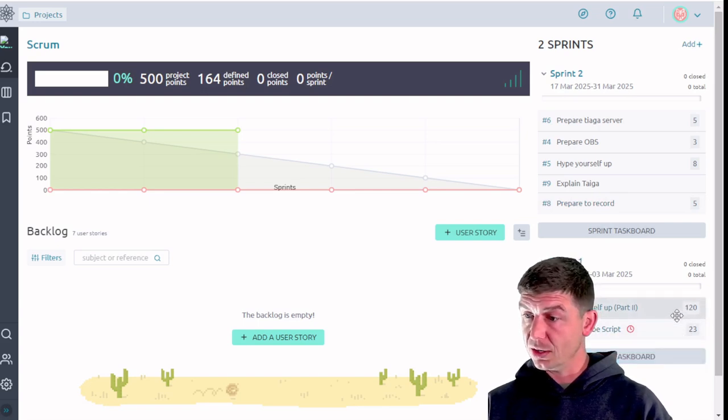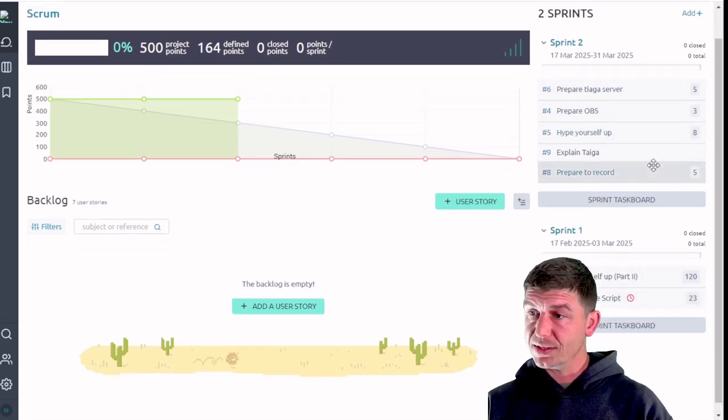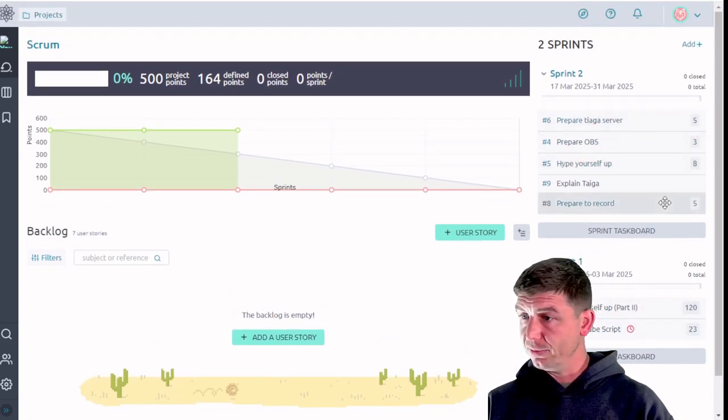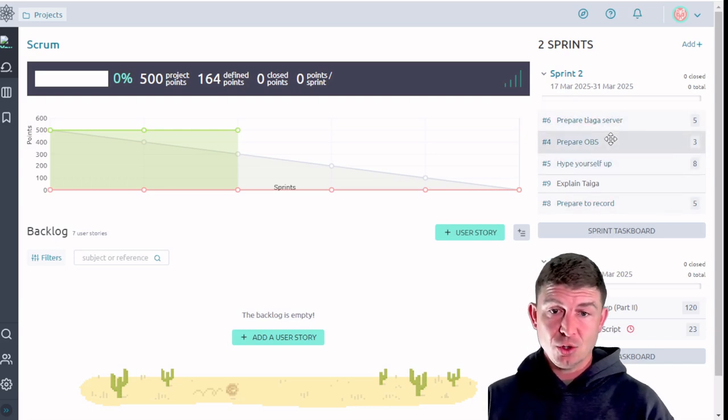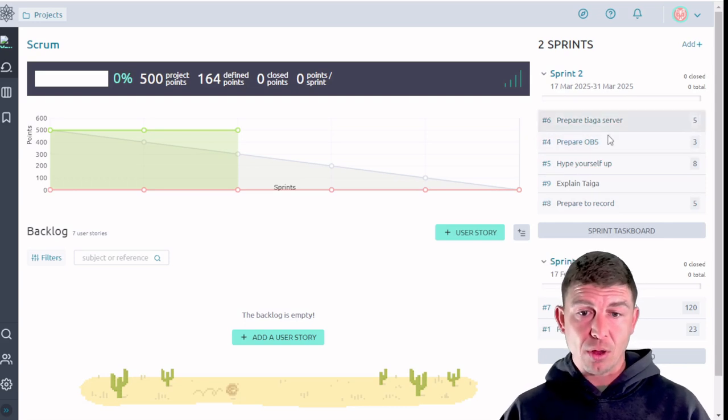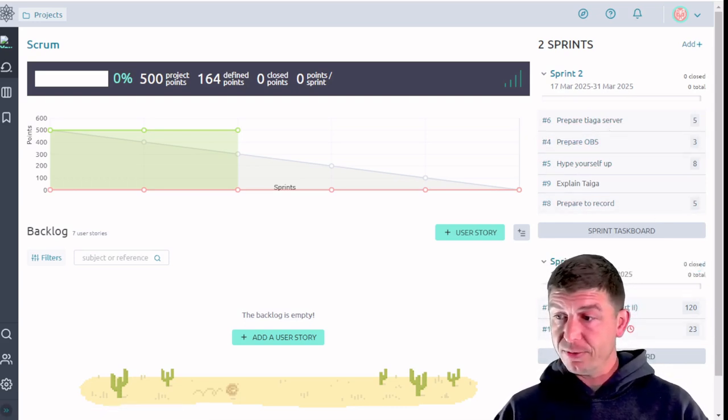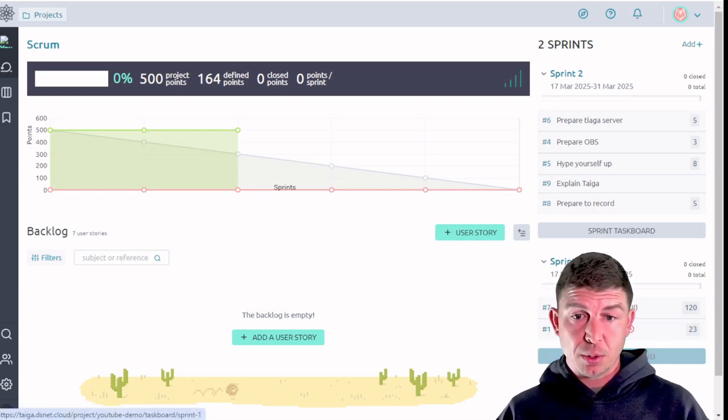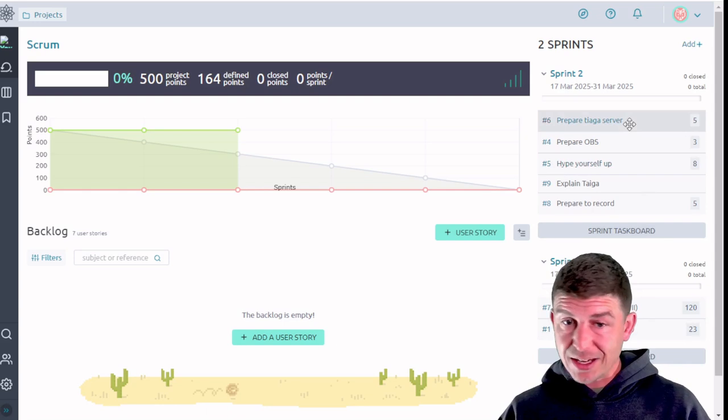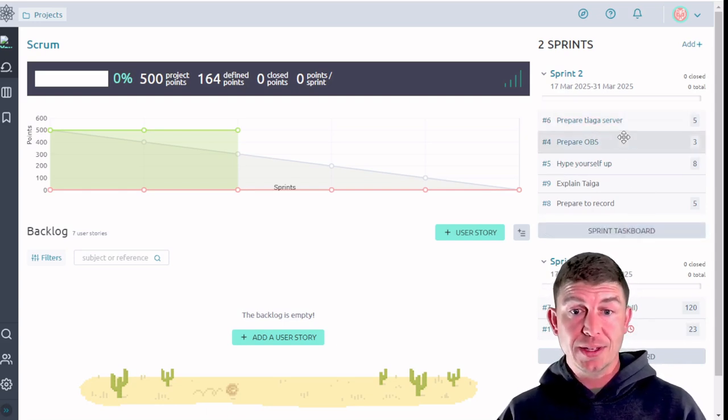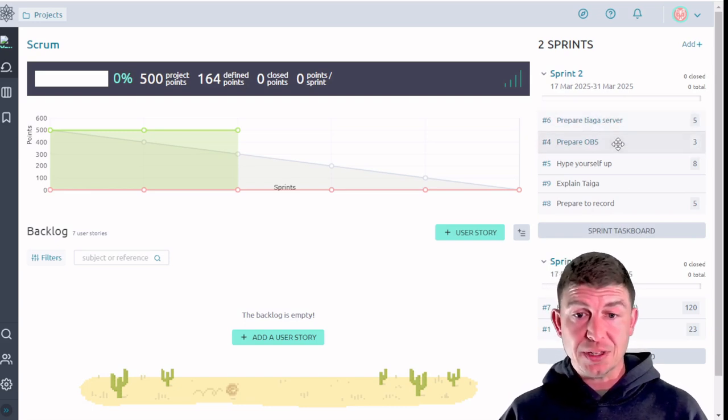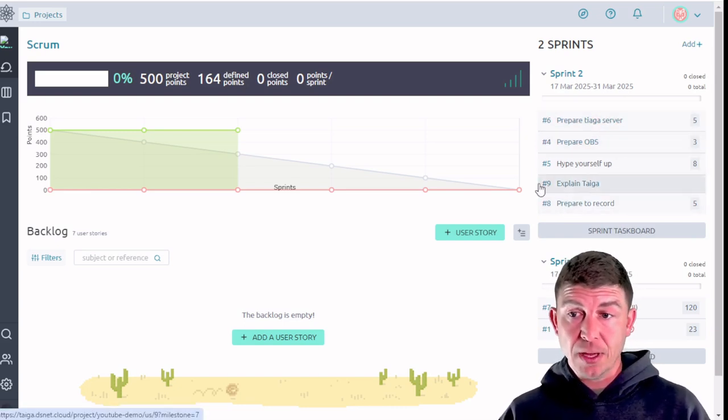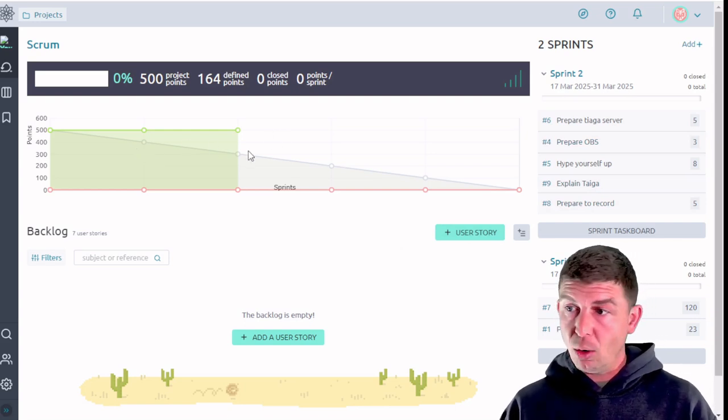Where in the second sprint we have, I don't know, somewhere in the ballpark of 20. So as new items get added to the backlog, if I can estimate that 140 or 160 hours are going to get completed per sprint, obviously you're going to want to assign them to a sprint in a realistic manner so that you can be sure that all of the items in that sprint actually get done.